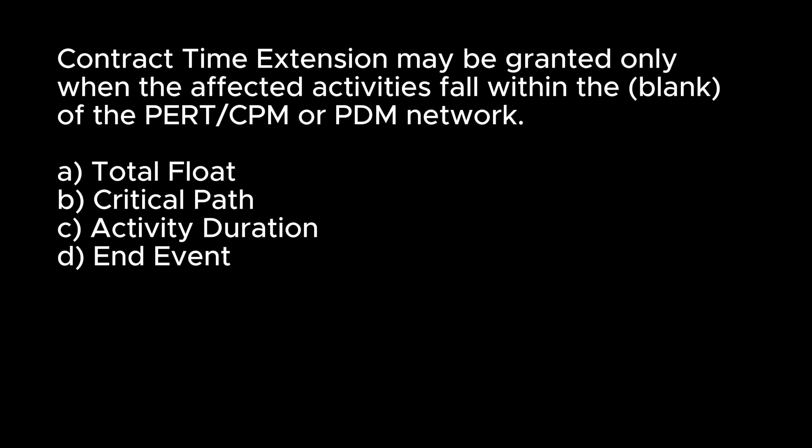Contract time extension may be granted only when the affected activities fall within the blank of the PERT/CPM or PDM network. A. Total float. B. Critical path. C. Activity duration. D. End event. Answer: B. Critical path.